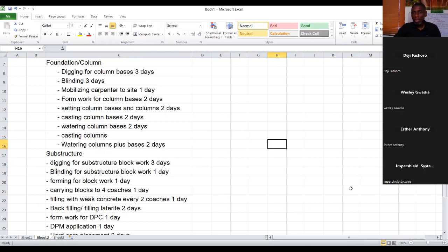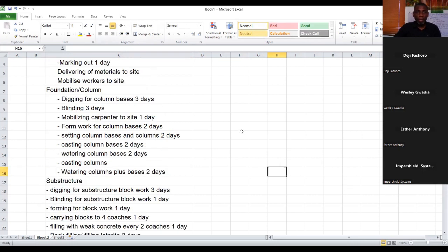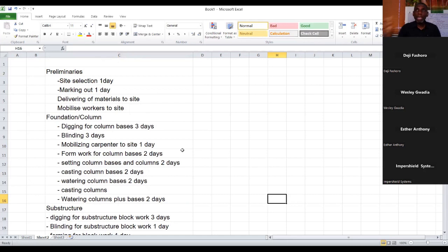The reason why you need to identify deliverables is if you want to track progress, right? Yes. You should be able to tell your client that though the entire project is, for example, 24 months, within 2 months we should expect this major deliverable.